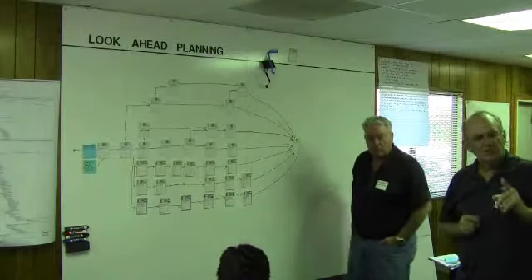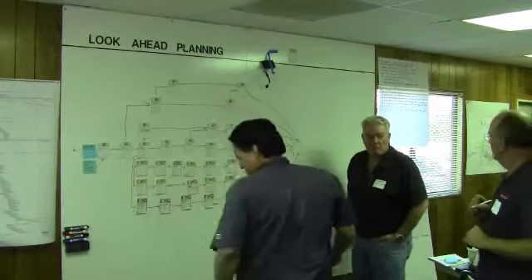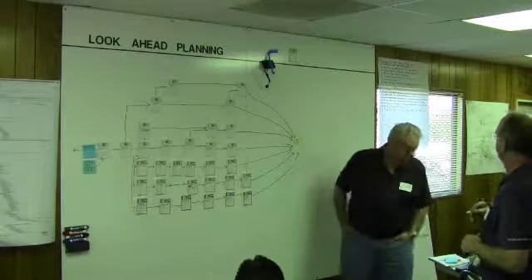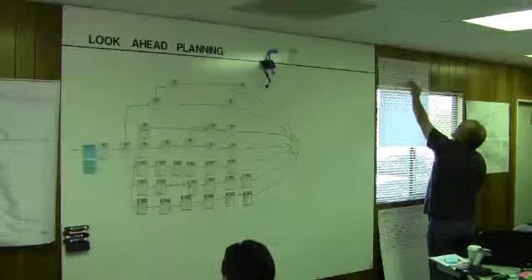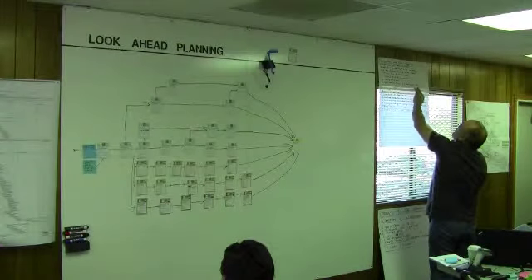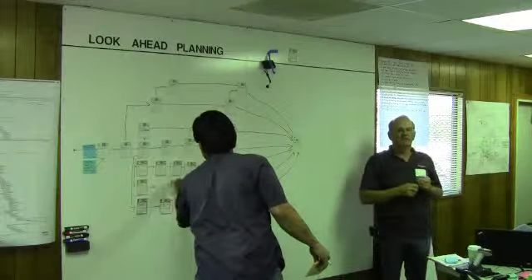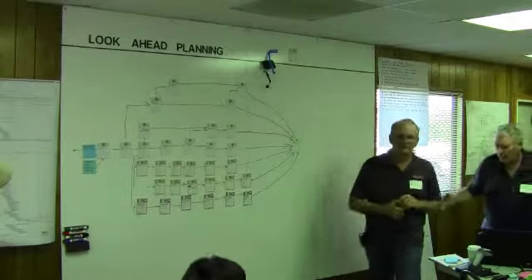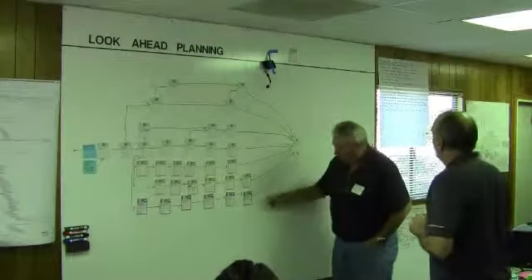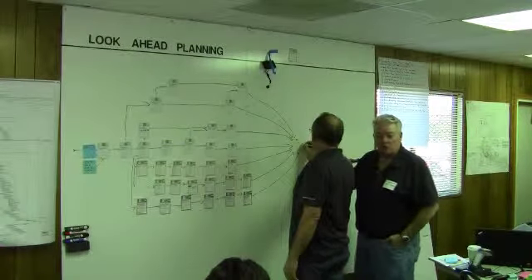Is this the only thing you've met before this point? You know what I could say? Rough wall. You know it's framing. I can add — six rooms framed, including loft rails, joists complete, including back of house buildings, with that little hallway. If you complete his work, rather than drywall you — correct — you're just as complete as you can be in that room. So that's the exercise we go through. We ask: is this the only thing from your perspective that constrains you from saying I'm complete? We want you to get used to using that word — constraint.